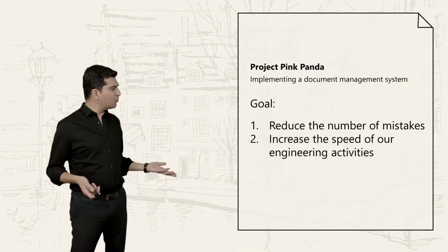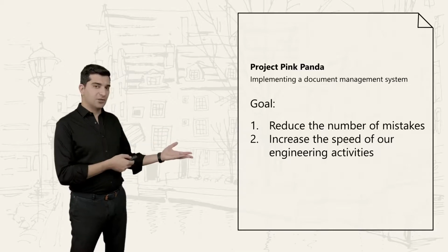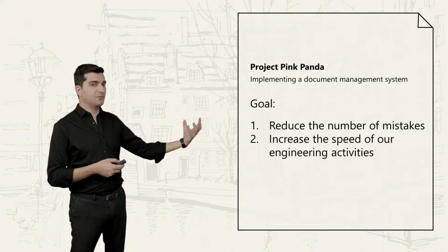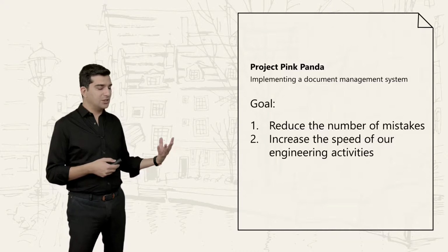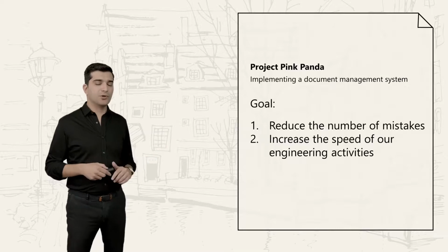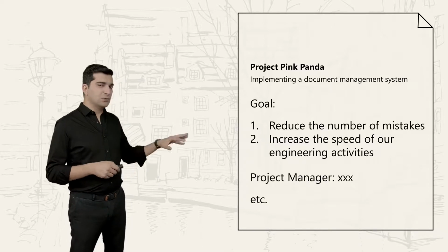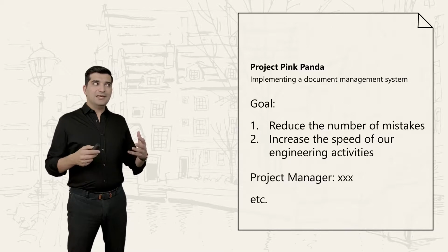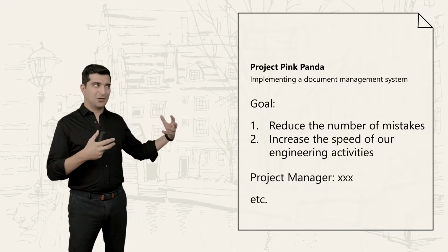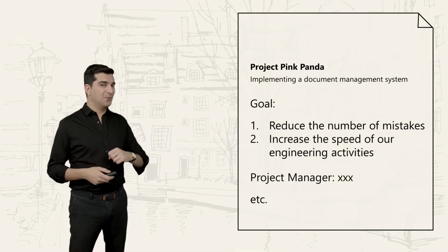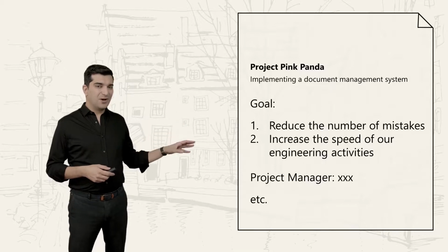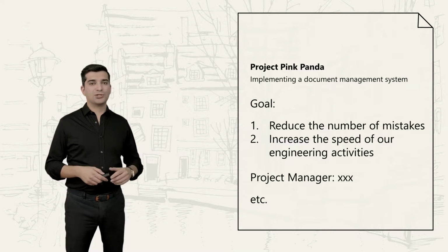So you write it down in a simple document, very simple document. And while we have it there, it's a very basic piece of information, right? The reason we are doing the project. You can also add some other basic information, for example, the name of the project manager, yourself, and some other things. And it's a good idea to have a name for this document. When we have names for documents, that makes the documents more serious. What is the name that you suggest? The name that the PMBOK guide gives to a document like this is Project Charter.